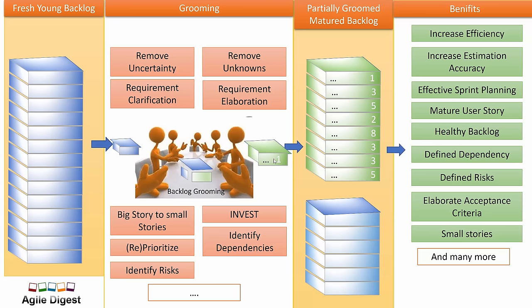When we talk about the 3C in a user story, the last C is for confirmation — that's the acceptance criteria. During grooming, we elaborate our acceptance criteria and make it understandable and feasible for the team to follow. Also, if there are very big stories, we can split them into multiple smaller stories. Smaller stories are definitely easier to manage, easier to estimate, and easier to execute. There are many other benefits you'll realize once you start doing grooming.